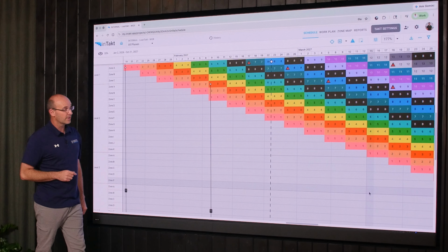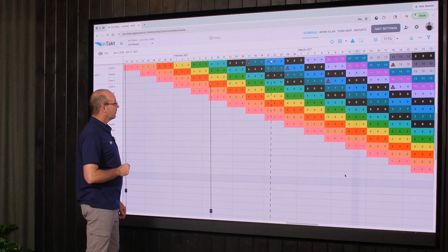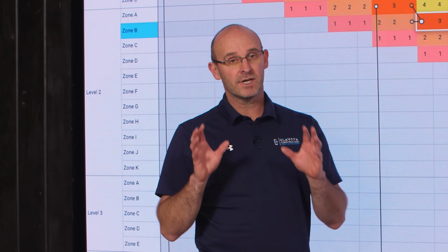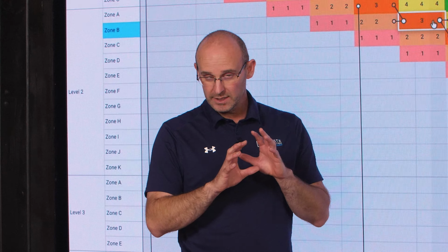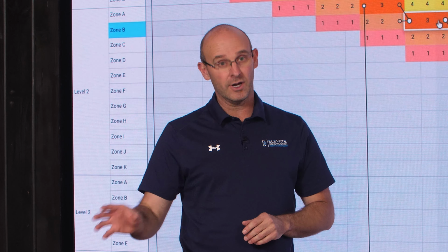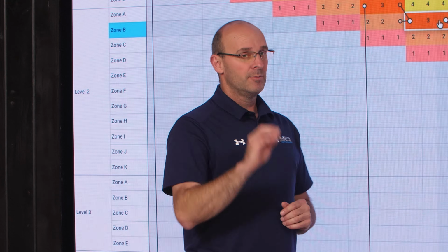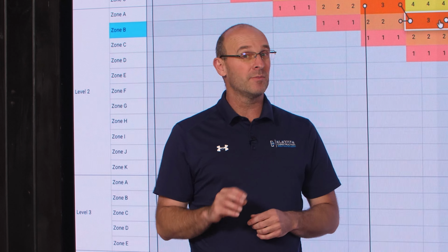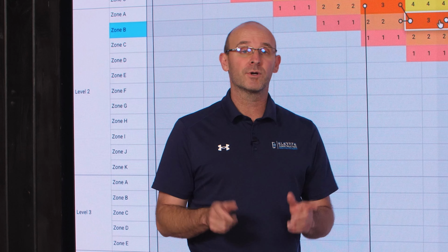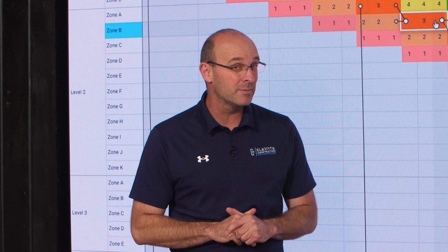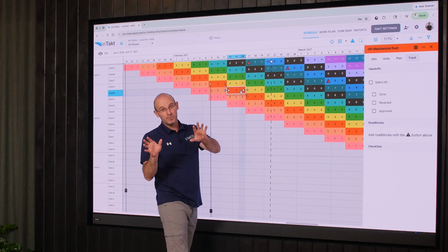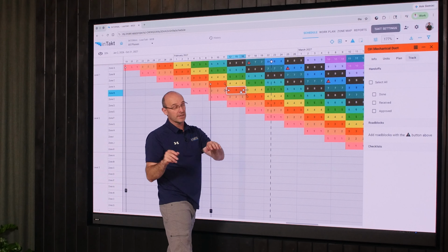So he's going to click on one activity, and I want to make a point before we begin. So when you click on this, CPM, which I do want to make a point, is a non-flow-based scheduling system, which I do not recommend. I'll pause with that. But CPM standards will recommend an average of about 3 logic ties. If you want to do production planning right, you have to have a minimum of 4 or 5, because you do have minimums of a successor and a predecessor, right?